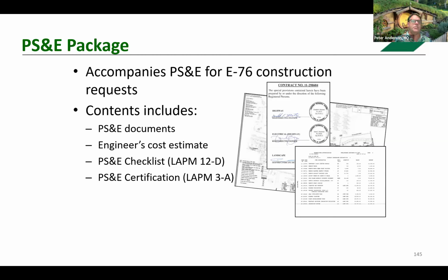Yes. The key thing is notifying all the potential bidders such that everyone has equal footing in putting their bid package together. That's the important part, that it is fair to all parties who are interested in bidding on the project.